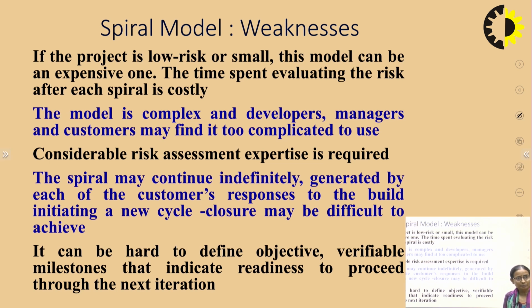The spiral may continue indefinitely, with each of the customers' responses to the build initiating a new cycle, and closure may be difficult to achieve in this case. It can be hard to define objective, verifiable milestones that indicate readiness to proceed to the next iteration.